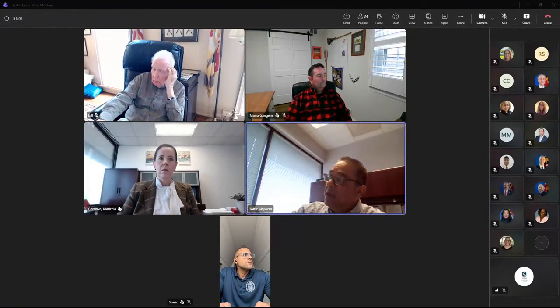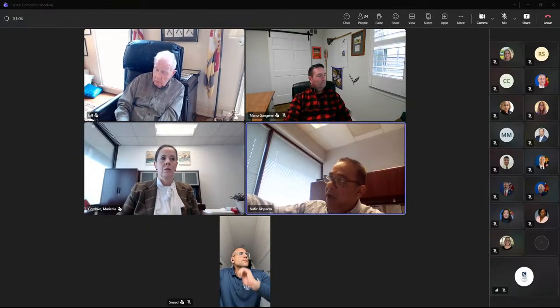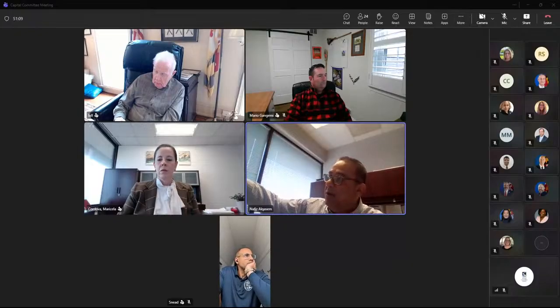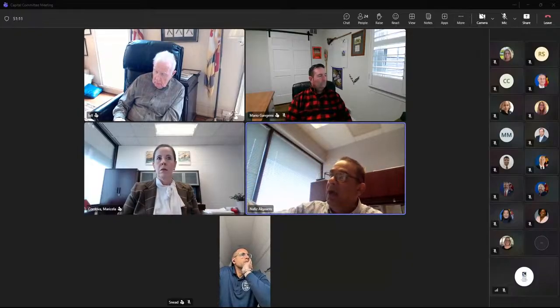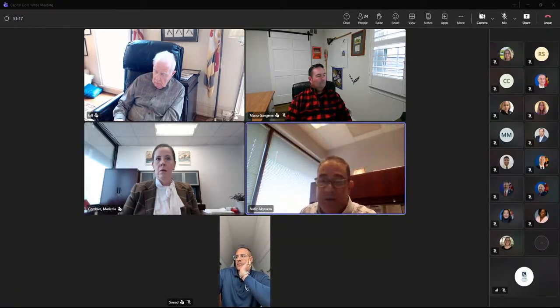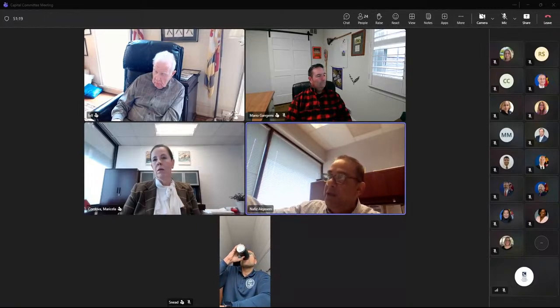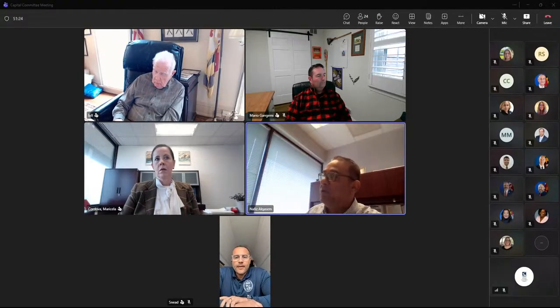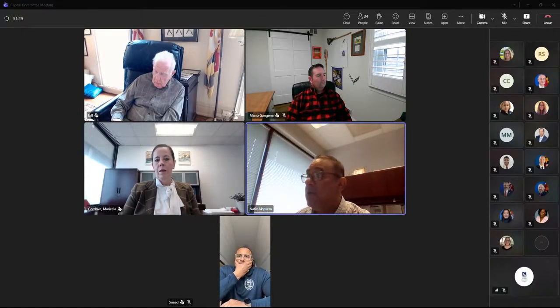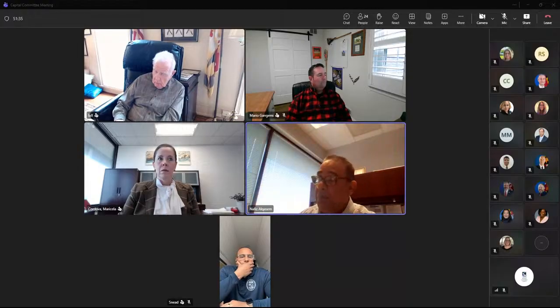When it comes to paint, this picture shows a containment of a deck truss span, similar to what's going on right there at the Hayden. When it comes to painting, 65 to 70% of the cost is for the containment system and surface preparation, because on a complex bridge like that it is a major operation that takes a lot of time and effort. The material and the 3-coat system itself, the paint, costs about 30 to 35% of the cost.